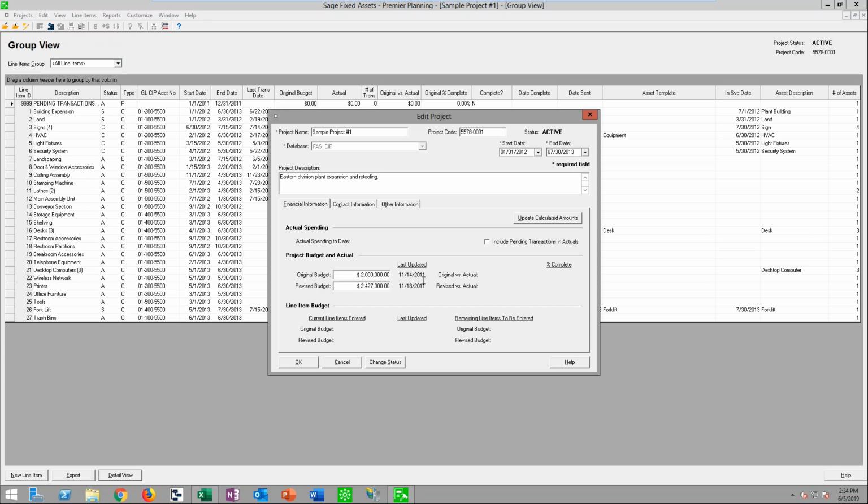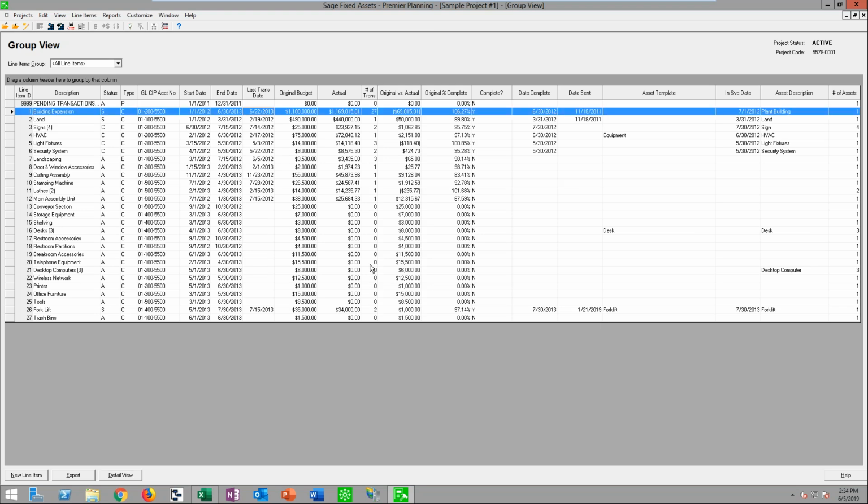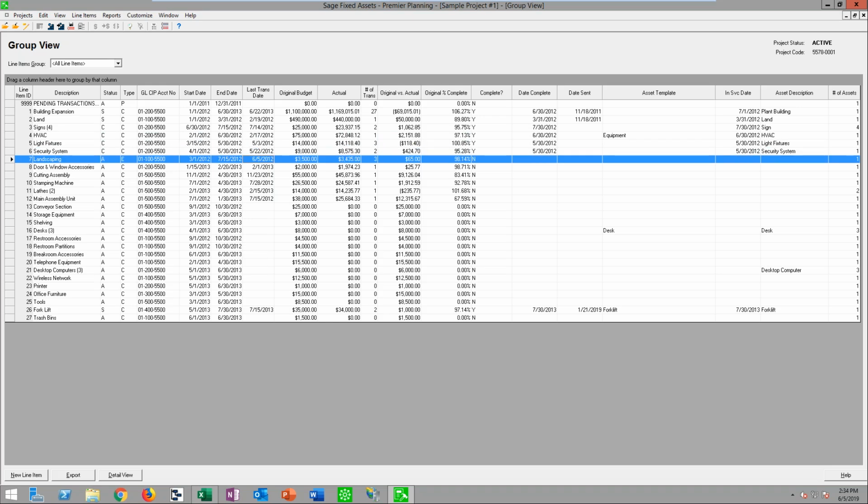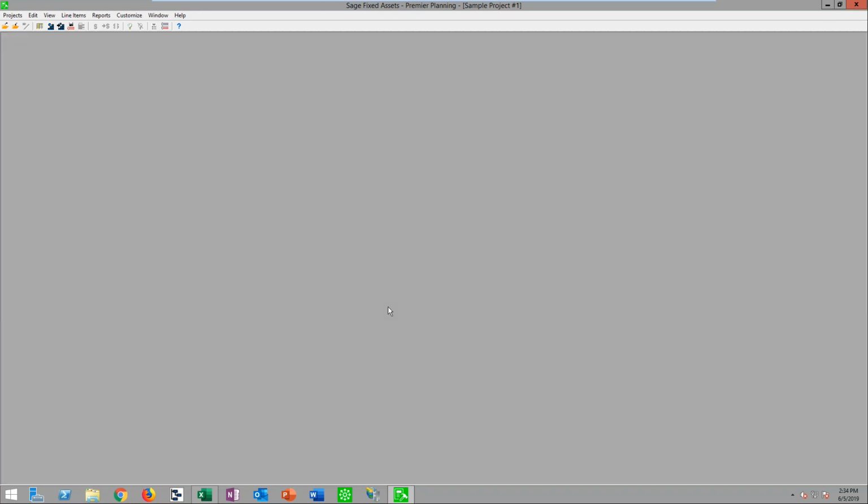in your project settings where you'll identify some approved amount or budgeted amount. And of course, if that number changed due to revisions and cost increases that are unforeseen, you can create a revised budget and report against either. The way my current project is laid out, and you can use this for any type of projects really, each of these individual line items are what's going to become a fixed asset.